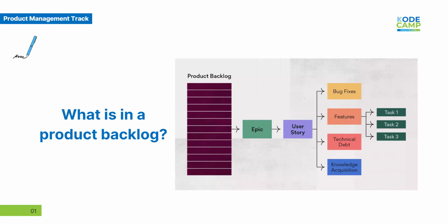That's why one of the unique things about a backlog is that it doesn't just hold features. It holds them in different sizes and different levels of readiness. A big story might live at the bottom of the backlog while it's still very rough. It's not yet broken out.